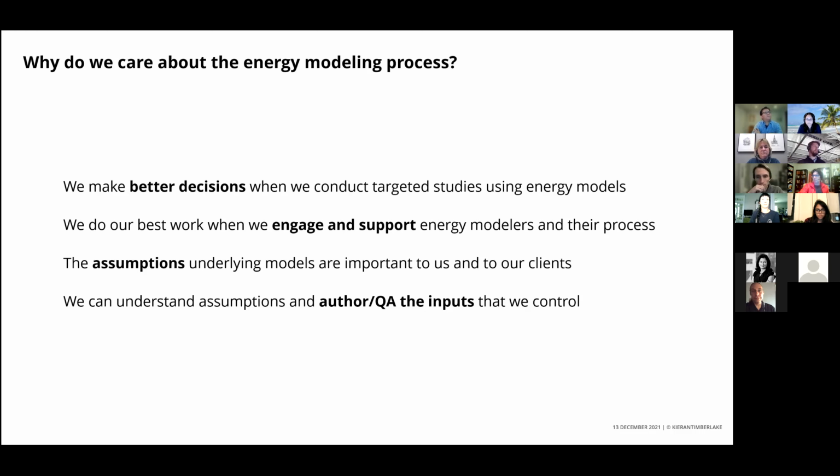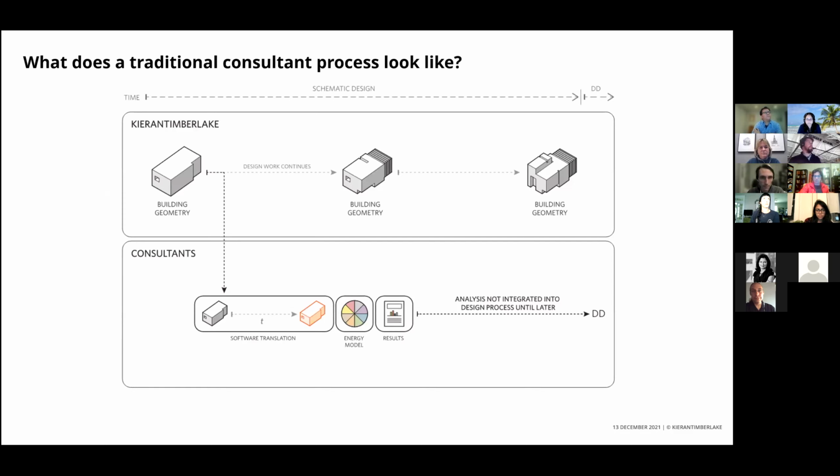First, we're just going to go into how we've considered the process itself. So asking, what does a traditional consultant-related workflow look like? Anyone who's had experience with energy modeling consultants may have had experience with this type of handoff. The simplest way is that architects will hand over a drawing set, specs, maybe a spreadsheet, and then the energy modeling consultant will take that and translate it into the proprietary energy modeling software, which takes a significant amount of time. It usually translates to 1 model per phase, just with the time it takes to do all that translation.